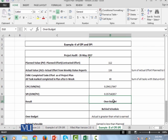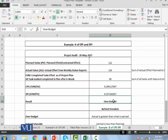This is not in the right. Obviously 1 is not in the right. Nearly to 1 is good, that is reasonably good. Over 1 is rare, but near to 1. Here is 0.29 CPI and 0.35 SPI.